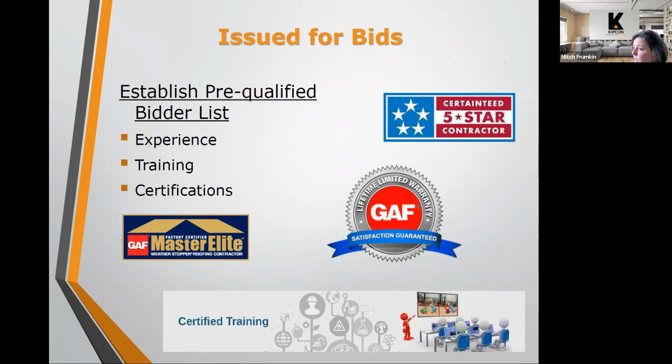For roofing projects, if there's a certain type of product being put in whose performance is based on the way that it's constructed and installed properly, oftentimes a certified inspector will need to come out to that site, or a certified contractor that is versed in putting those materials on, those certain roofing materials, for example.